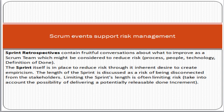Remember, a sprint itself is in place to reduce risk. There is an inherent desire to create empiricism. The length of the sprint is considered in terms of risk of being disconnected from stakeholders — limiting the sprint's length is often limiting risk.